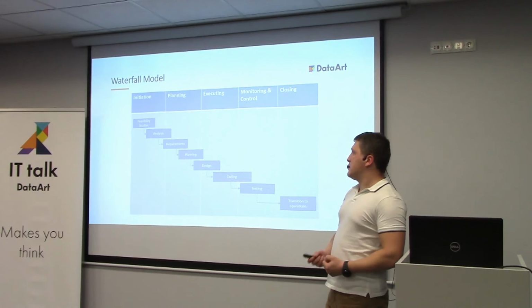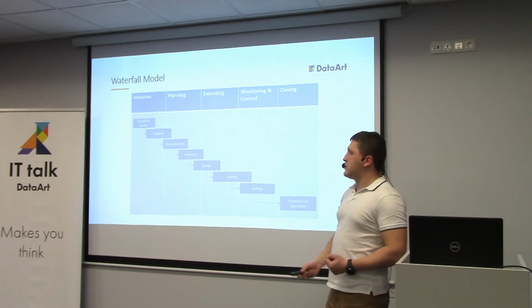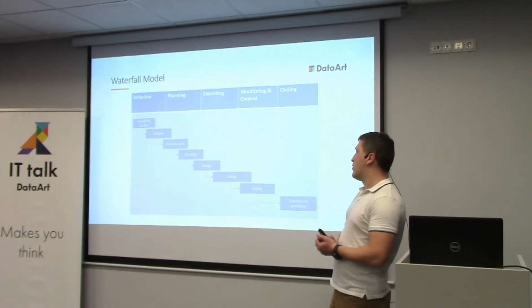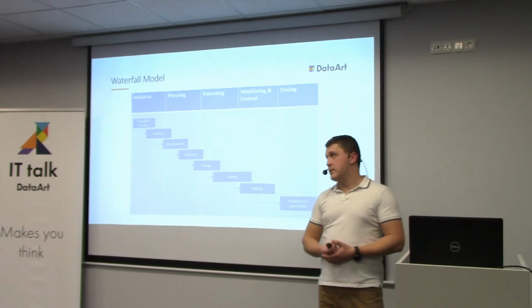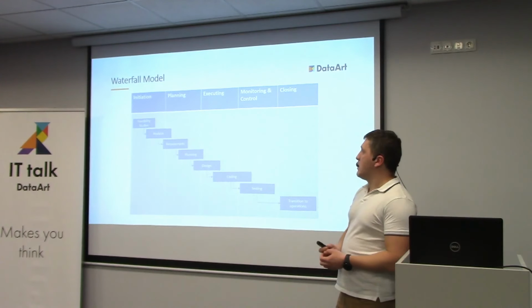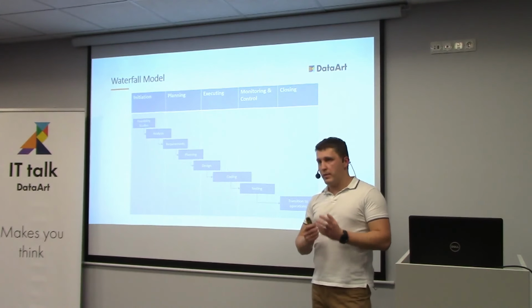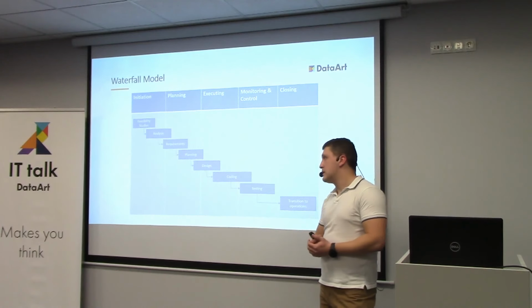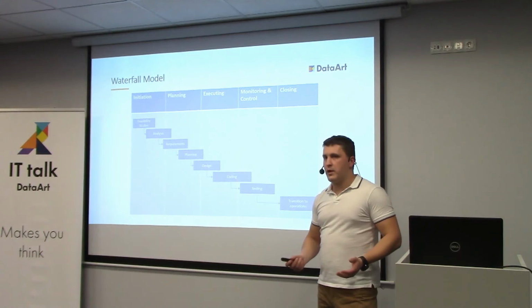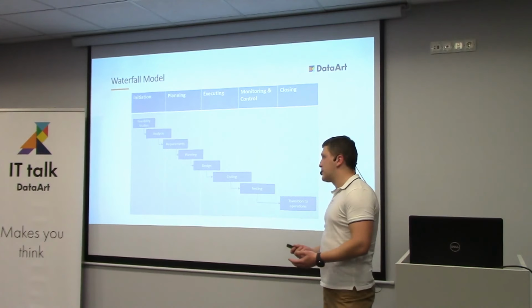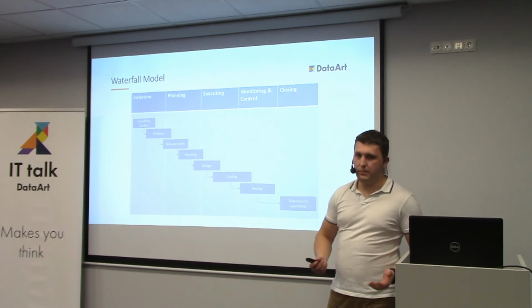Having this said, I need to mention that waterfall approach, waterfall model still works very well in certain industries. For example, when you produce medical equipment or software for medical equipment, in most cases you can't afford trial and error approach because people's lives can depend on it.